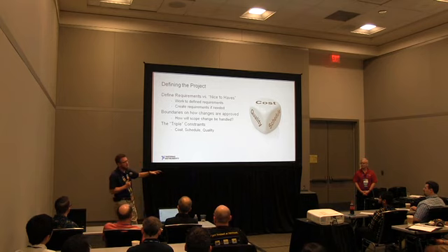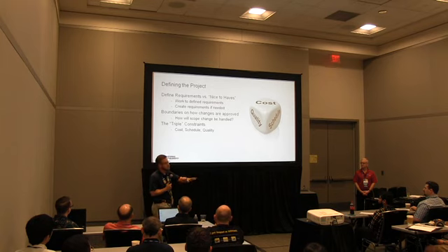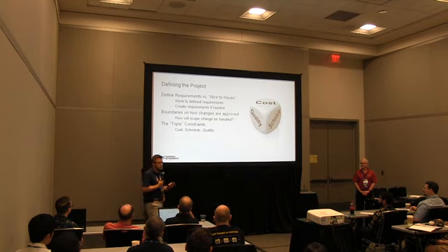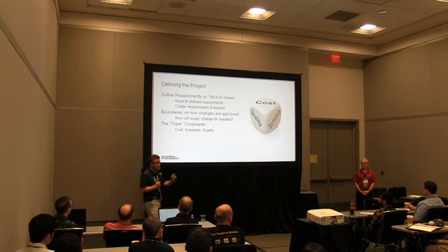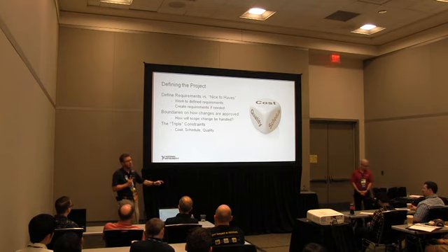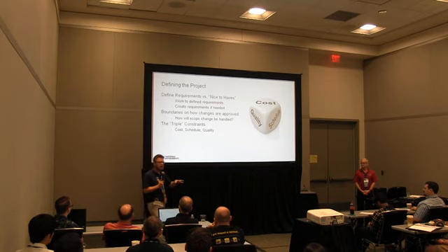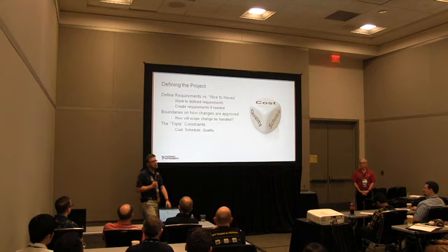And I'll add something. We talked that it's really important on fixed price because you don't want to have to eat that work, depending on who your customer is, whether it's an internal customer or an external customer. But it's also very important on a time and materials project because there's a set of required work that has to be done according to your contract. And if you get a bunch of nice-to-haves done and you don't have the core functionality done, you haven't met your contractual obligation. So even though they kind of agree, they say, oh yeah, don't worry about that, let's do this instead, you got to get that in writing. You got to get approval to do that.